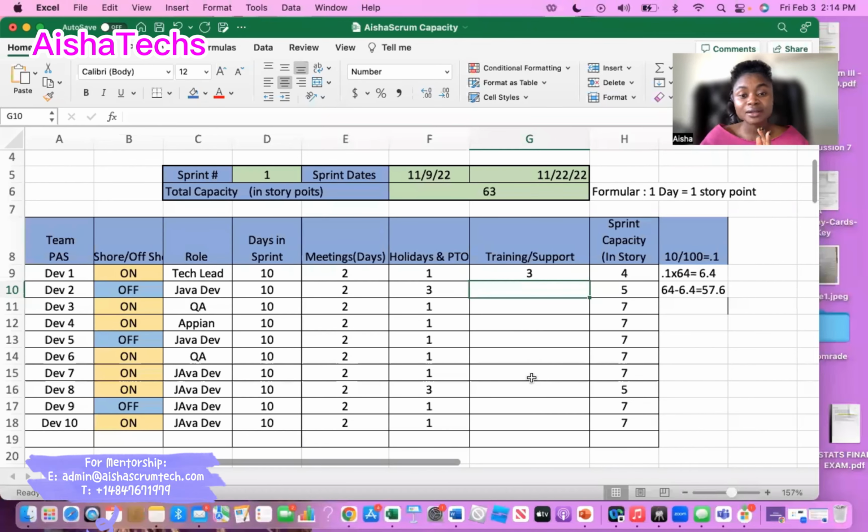That's why I love to have this column, so that when I'm taking these days off and I'm asked how I'm coming up with these lower numbers, compared to historical velocity data saying they have a velocity of 70 and you are committed to 30, I can say, oh yeah, I'm doing this just because we have training all week long. That's the reason why I love to do capacity, because sometimes velocity is never accurate, right? You see it fluctuates based on vacation, holidays, and every other thing. But I like to keep capacity because it gives me true detail about what happened in each sprint.